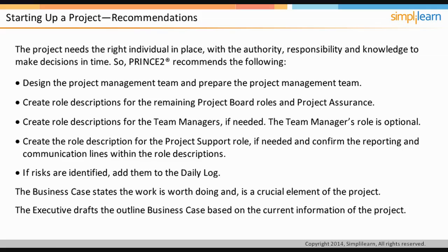PRINCE2 suggests that it is essential to understand the objectives of and the reasons for the project. That is, what the project is to deliver and how the project will be funded. The project brief includes outline business case, project product description, project approach, project management team structure, and role descriptions. Let us learn more about project brief in the next screen.